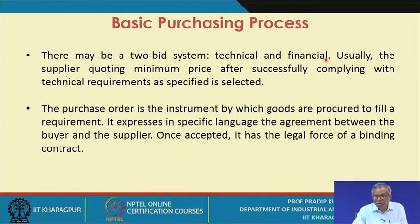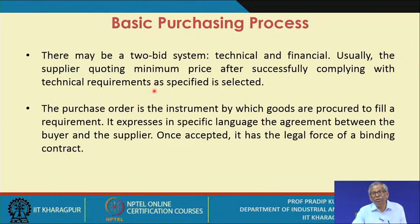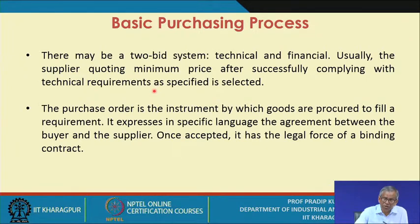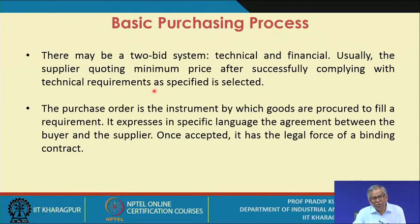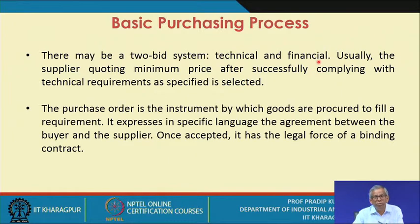These two bids are known as the technical bid followed by the financial bid. You invite quotations from prospective suppliers and ask them to submit both a technical bid and a financial bid. Usually the supplier quoting the minimum price after successfully complying with the technical requirements is selected. First you check to what extent each bidder fulfills the technical requirements for the given order, and only once a bidder passes the technical bid is the financial bid checked or verified.